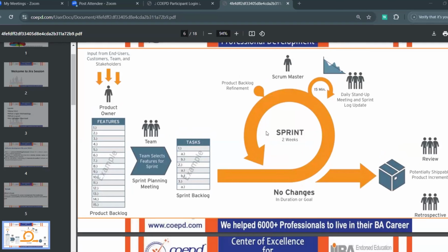Here, daily stand-ups. In daily stand-ups we'll discuss what did I do yesterday, what will I do today, and are there any impediments in your way. All these things are discussed here, and this daily stand-up will be held for about 15 minutes. The duration will be 15 minutes.